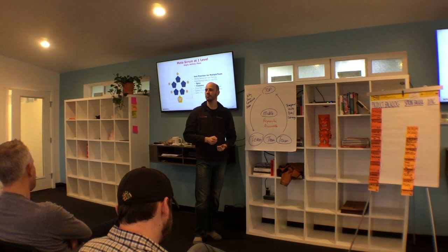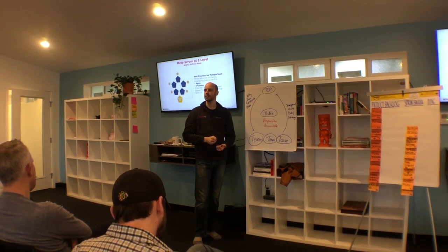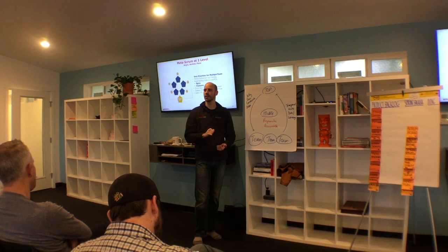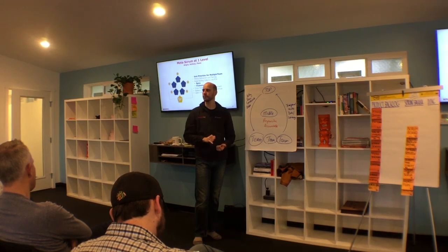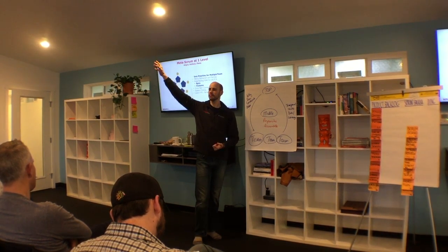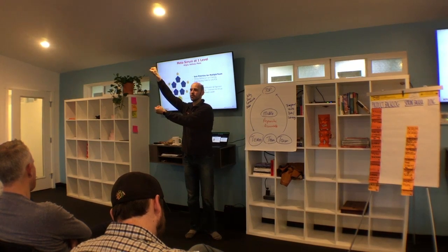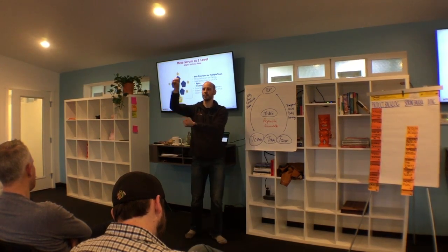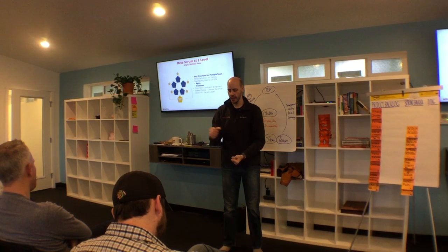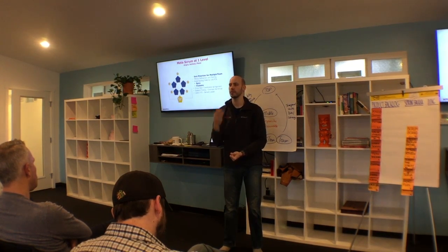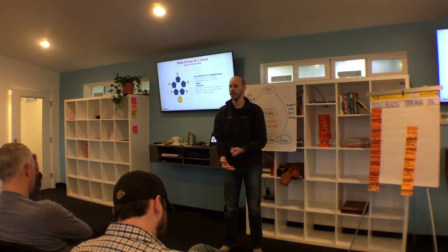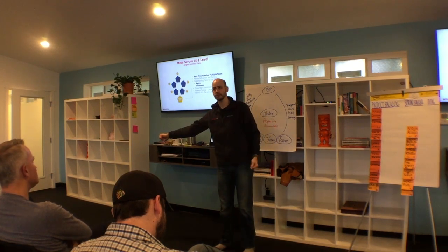So that has to happen before the team's sprint, the team level product backlog refinement. So in meta-Scrum sprint planning, the product owners pull chunks from the parent backlog and bring it to the team product backlog. Then the team meets with that product owner to refine it in their product backlog, and then the team does their sprint plan.